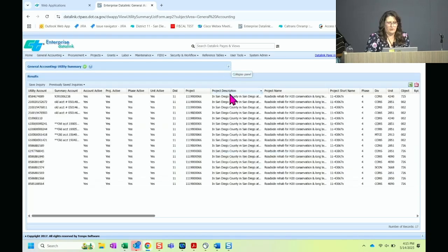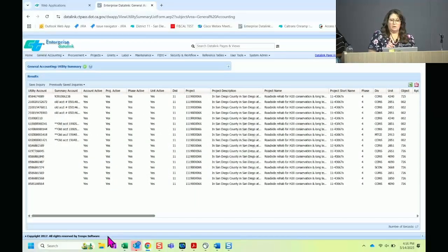Okay. So if this was a project that we were going to shut down and you're going to go to project control and say, hey, we're done with construction, phase 4, we're done. Somebody needs to turn in paperwork to shut off all of these accounts. And this account is for fixed phones, water and sewer, mobile phones, all kinds of stuff. Verizon Wireless, City of San Diego, Otay Water District, California American Water, doesn't matter. Every single account has to have paperwork submitted to accounting to make sure two things.